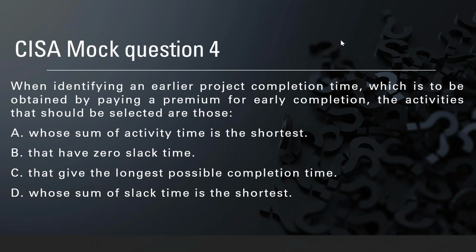So this question is on slack time, from domain 3, which relates to CPM, the critical path method, with slack time. In this, you have to understand what slack time is. Slack time is the time by which the current activity can be delayed without impacting the very next activity. If the current activity cannot be delayed, because it impacts the next one, it means it is very critical. You cannot delay it even for a minute or even for a day. So that is what it means.